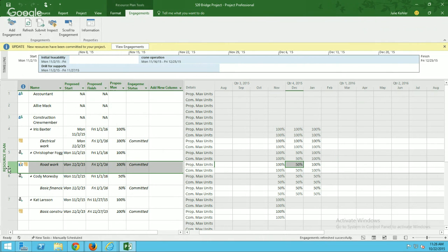Okay. So what would be our checks and balance in that scenario if a PM has changed these numbers but they have not sent the notification to the resource manager, and the resource is being asked to work extra hours? So is there some kind of a red flag that shows up somewhere? Probably. Yeah, go ahead. Let's say that they changed something for Cody and they don't have approval, because right now they currently have Cody for 50%, and let's say they requested 100%, but it hadn't actually been approved by the RM. If they tried to assign work to Cody that went over that 50%, then they would see the indicator that said, this engagement doesn't fully cover this. Okay. So, but it still depends on the PM to be able to say, okay, this is the right thing to do. Talk to the resource manager. Yeah, they will get the indicator, but there's nothing stopping them from doing that.